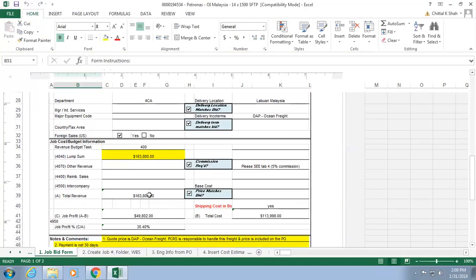Also, based on the total value, bids have determined what our potential cost should be on the project, right? This is done by a WBS, a work breakdown structure. They're going to split dollars into different buckets and figure out what it's going to cost us. So that's total cost. They take this lump sum price minus the cost, which becomes your job profit, which is also calculated in percentage of work, right? So it's a pretty simple day-to-day math.